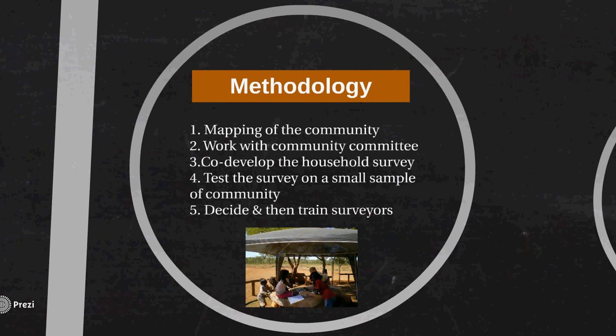Step 1 will conduct a mapping of the community to understand its dynamics. This will determine who holds the positions of authority and power, what community organisations or associations exist that the project may align with, and what culturally respectful, appropriate processes should be followed if the project was to facilitate the establishment of a new community committee.